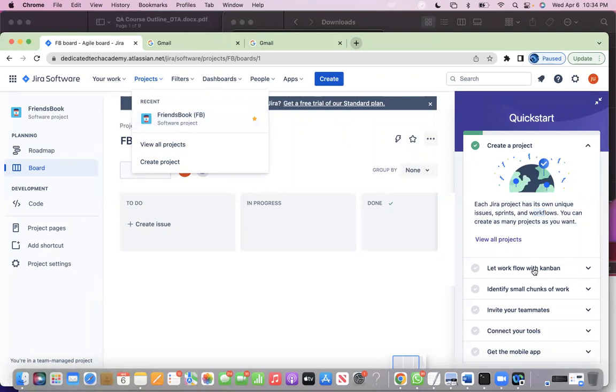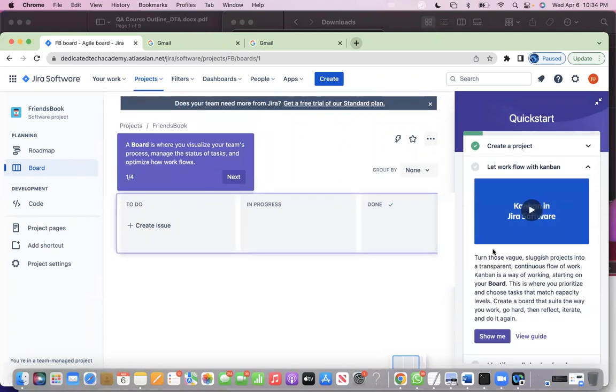All right, then we have Kanban, right? Kanban is another way, another board. So we have Agile board and we have Kanban board. Kanban board means you will continue to have a to do list, and developers are going to continue to put it into in progress and get it done. And the tester will do their part, and it will continue to move. There is no short duration. A Kanban approach doesn't mean it's 2 weeks or 3 weeks. It doesn't mean anything. You continue to work. As long as you have tasks here, you continue to work and get it over to this side.